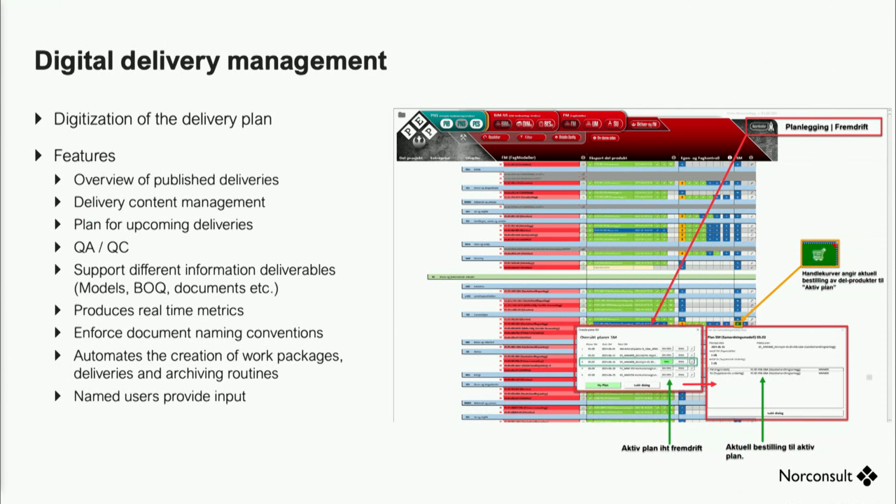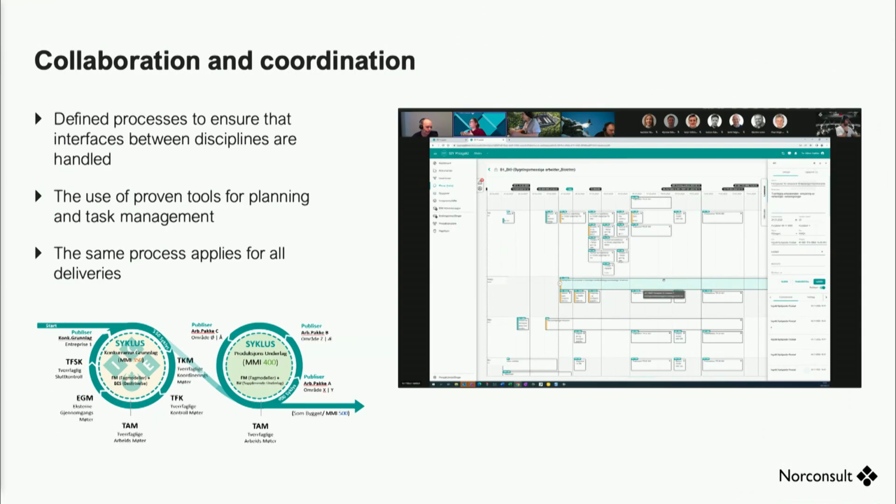We are able to enforce the document naming structure, information structures and naming conventions in the project. It's aligned with the breakdown structure both from the client and for the different contracts and contractors that are going to be involved. That means nobody has to create their own or follow manual procedures on naming convention, breakdown structures, information requirements and so forth, but everything is given by this solution.